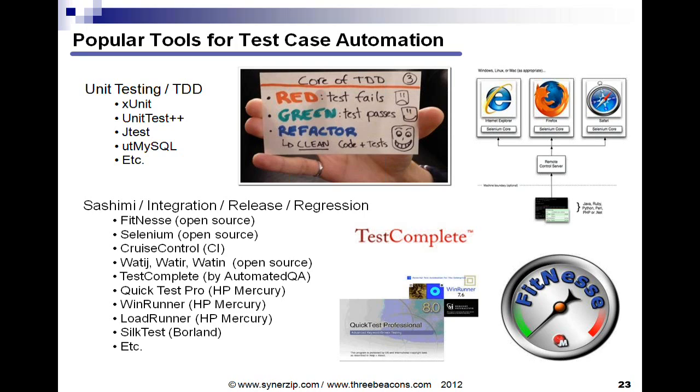Because if you're having to do manual testing, often you're probably so busy doing that there's just no time to develop the automation testing. Another way to approach it is when a new project starts. Consider this. Instead of spending your time developing manual test procedures and executing those, spend that time developing test case automation instead of what you were doing previously.